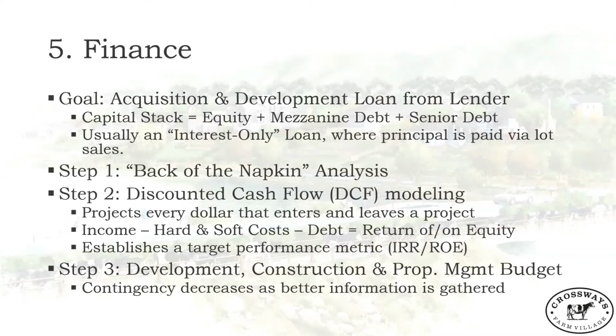Finance is difficult too. Thankfully, at this stage, we're still in due diligence, right? So we have not actually purchased the dairy farm land yet. We're still in that 180-day period, but we're starting to sweat a little bit. In order to build Crossways Farm Village, we need a pretty substantial acquisition and development loan that's going to provide 75% of the total development cost.